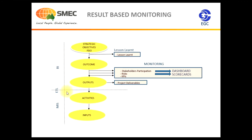If we divide this whole result-based monitoring system into a computer-based system, it has three parts. One is the MIS part, which comprises inputs and activities. Then there is the ETL part — ETL stands for Extract, Transform, and Load tools. And then the BI part — BI is Business Intelligence — which provides the means for monitoring. The output of all this exercise will be project deliverable reports, KPIs, risk monitoring, dashboards, and scorecards.